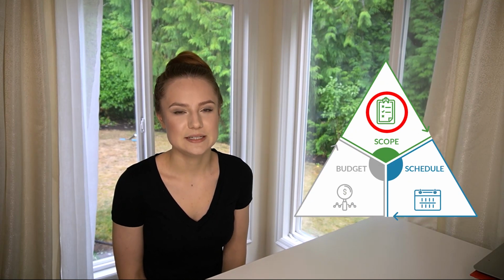Luckily, they were able to handle this by adjusting scope. Daniela cut a less necessary feature out of the product requirements in order to make time for the necessary fixes. They will now ship a much more usable chatbot in time for November. That is the story of Jim and Daniela. Transparency, trust, and a solid understanding of each other's role is critical for the product and project managers. They overlap in a number of areas, but when working well together, they form a dynamic duo that empowers everyone on the team and creates enormous leverage for successful outcomes.